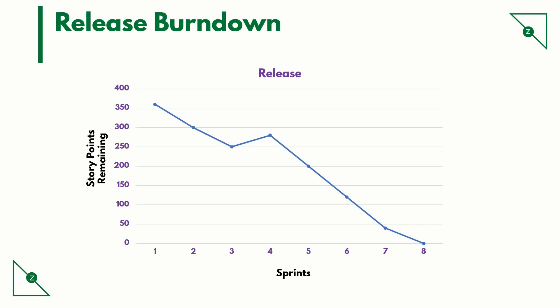Release Burndown. Progress on a release can be tracked by means of a release burndown chart. On the y-axis, we can see the story points committed to the upcoming release. On the x-axis, we have the total number of sprints for this particular release — in this case, there are 8 sprints. As stories get closed as part of individual sprints, the work gets burned down.